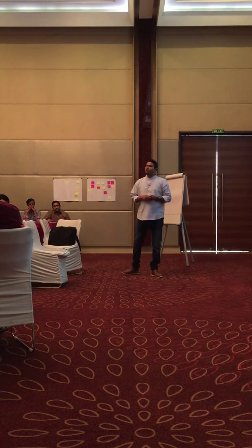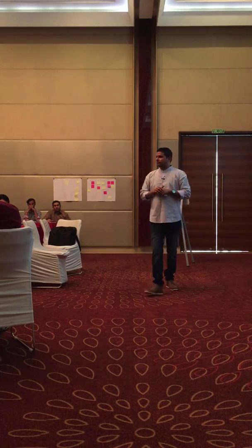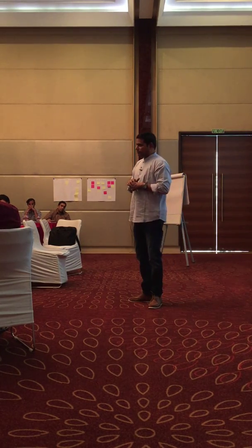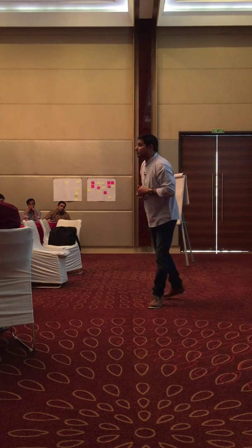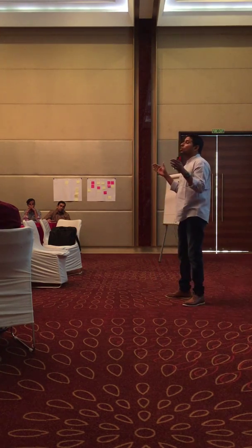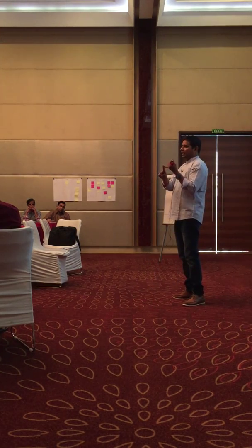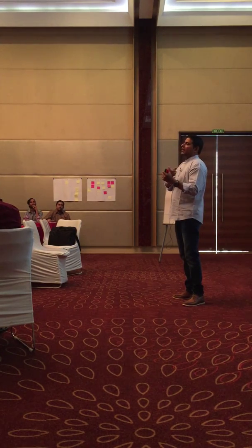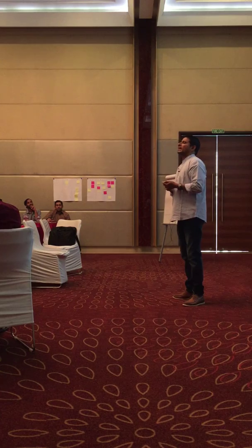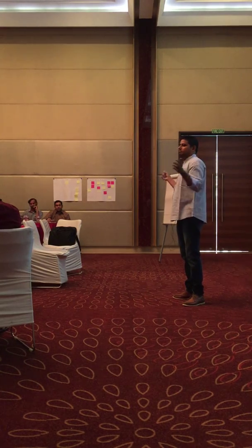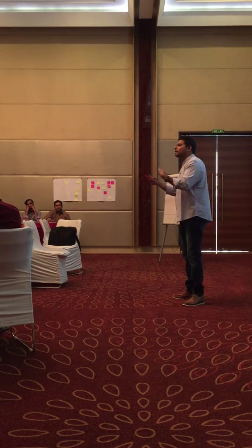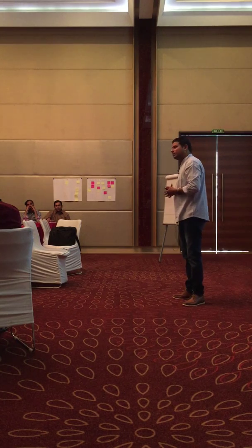Okay. Now, one last question for you. Yes. Is the product backlog refinement part of the sprint or? It is part of the sprint, but it is not part of the core ceremonies. Like we have planning, daily standup, review, retrospective. So this is called an activity. Product backlog refinement is an activity. You can do it anytime in between the sprint, or you can do it multiple times, spending half an hour, 1 hour, anything is fine.